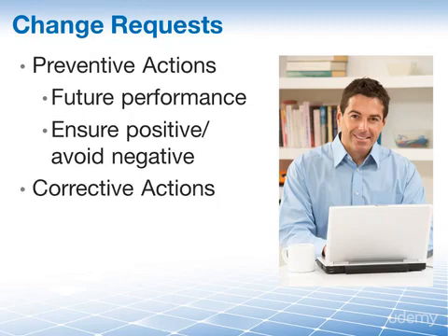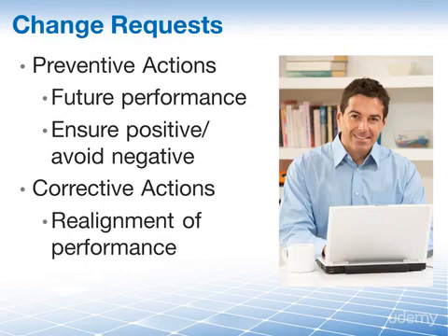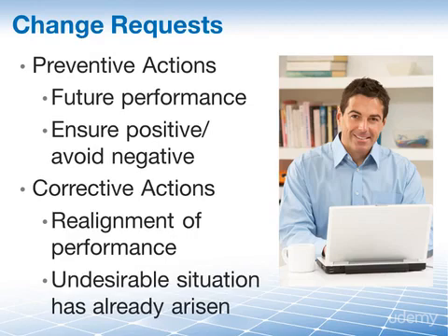Corrective action, the PMBOK guide here defines this as an intentional activity that realigns the performance of the project work with the project cost management plan. This is the second type of change request. One way of thinking about this is that you are taking an action to address an undesirable situation which has already arisen or may still be ongoing. This would be the case if you already had an existing issue with your project files. For example, you have already run out of space or lost files. If you then spend for extra servers or a document management software, then that would be considered corrective actions.